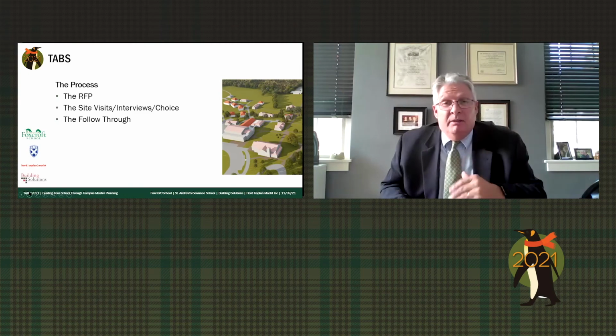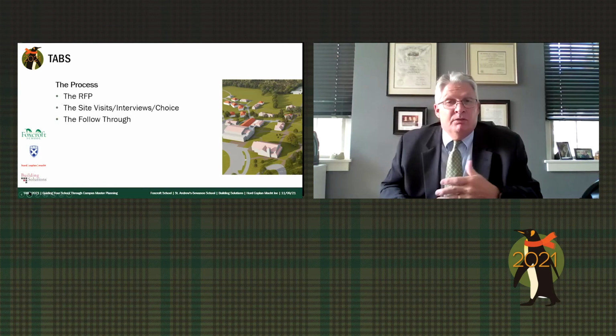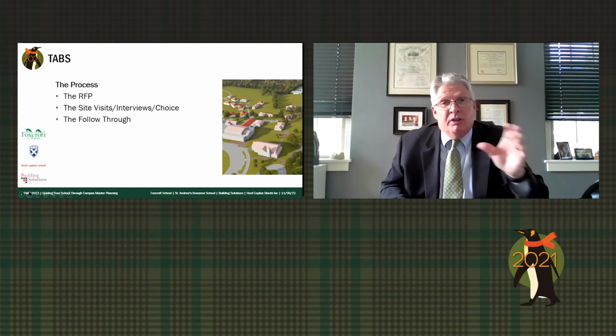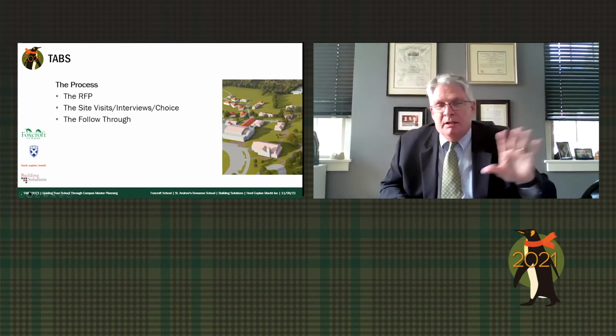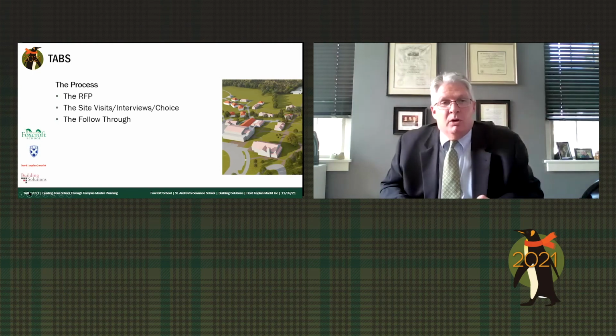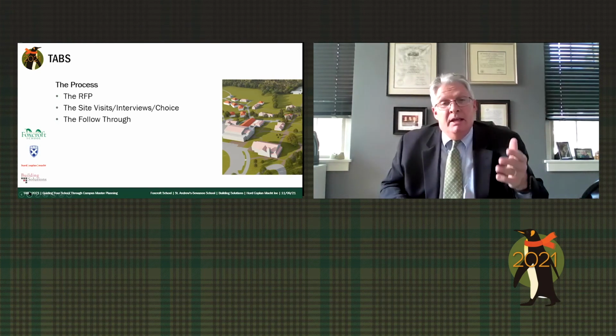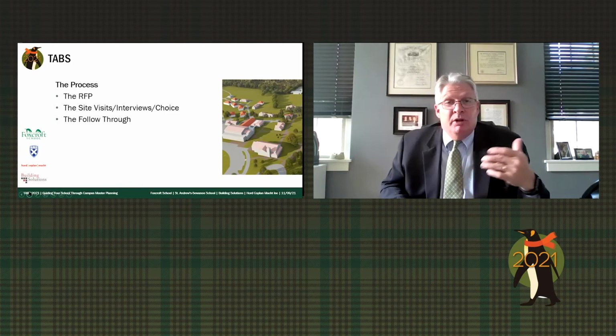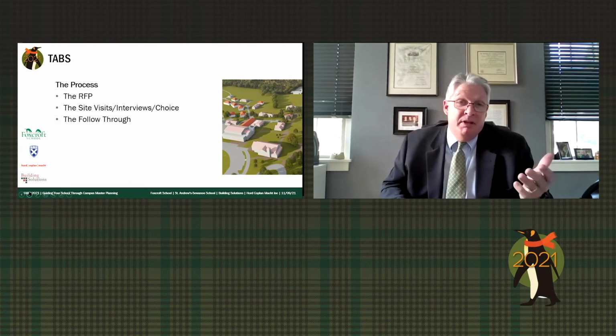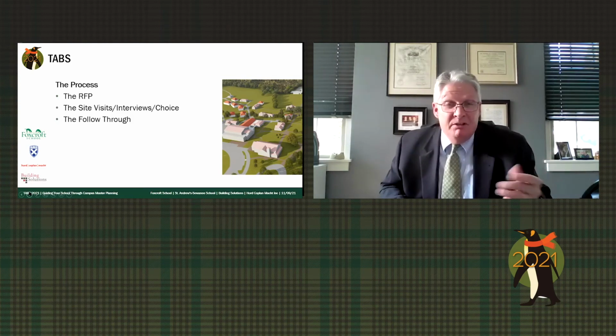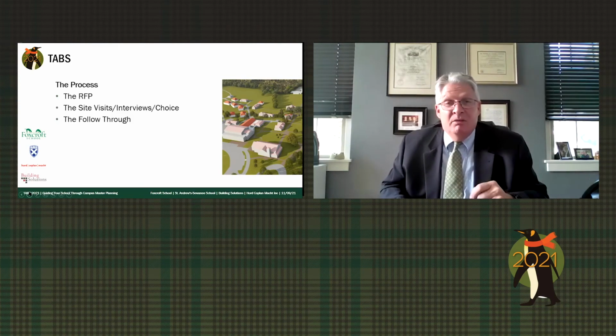They organized and managed the original site visits. We had 7 of the 8 firms come to our campus, and they organized the site visits for those firms who were bidding on the project. And of course, they came to the site so they could gather information so they could go back and work on their bids. And then Building Solutions went over the bids once they came in, helped us understand what was in the bids and what was not in the bids that should have been in the bids. Something, again, that we wouldn't have had a lot of experience with.